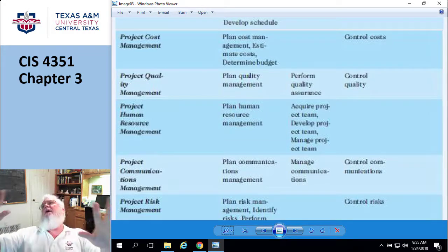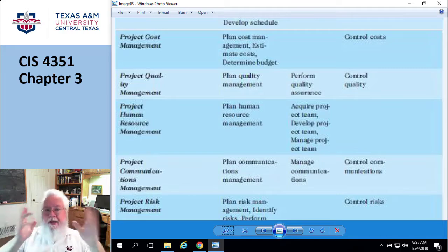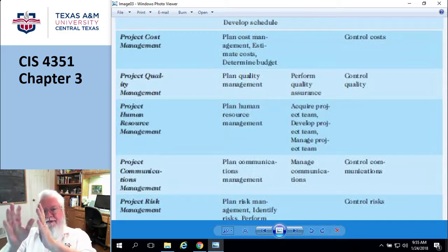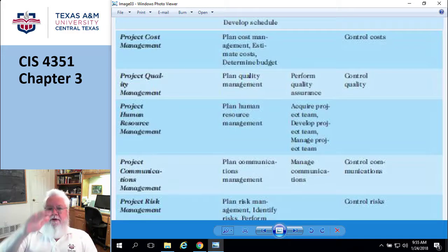And you're going, oh, geez, that's going to take forever. But if I broke it up into chunks, let's do the payroll piece, the inventory piece, the manufacturing piece. So sometimes you want to split projects up. Likewise, you're looking through the pool of potential projects and you go, these two are kind of related. We can lump those together and get some efficiencies. So that's one of the things you do at this stage: lump or split.